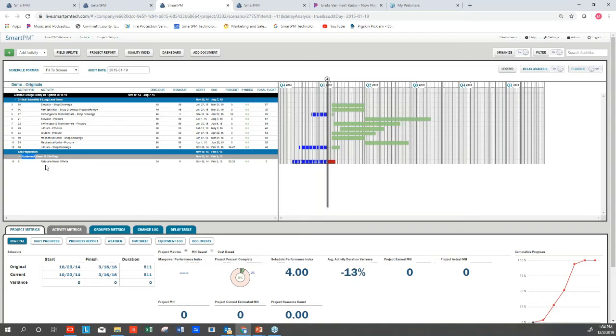And an example of what happened, like why is that a bad thing? Well, it's not always a bad thing, but right here we'll see that elevator procurement is on the critical path. It is a 50 or 90-day duration activity. So if elevator procurement is delayed or doesn't start on time and all its follow-on activities don't start, because we've got this 90-day fabrication duration that could probably be 40 days if we really wanted it to be, we want to make sure that those aren't hijacking the critical path. But in this case, I don't see too many issues.